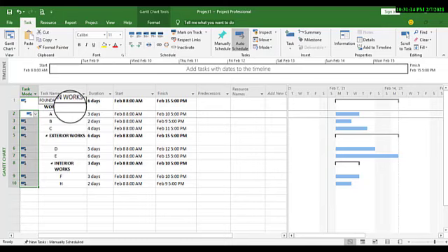within the foundation works, we are going to spend 6 days to complete our foundation works, and it will start from February 8th, which is 8 o'clock a.m. to February 15th, 5 o'clock p.m. When it comes to our exterior works, it will start from the same date and it will end on the 15th, which is also another 6 days. When it comes to the interior works, it will have 3 days to complete it.